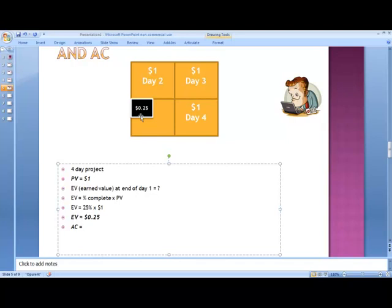Not only did it rain, we also had to keep paying these employees or these contractors to get this work done. Now they couldn't do the work, so they were on standby. They were just standing around, sitting on the bench, but they were being paid. So let's say we actually end up spending more, because when the weather issue goes away and they can actually work, it's late in the day and they can't finish all the work they anticipate. So let's say they end up spending one dollar fifty cents at the end.